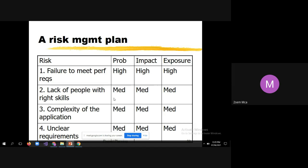For 'lack of people with right skills,' the probability is medium — for example, if you don't have someone who can do automation, you can bring an existing member from another project or provide training. The impact is medium and exposure is also medium. The mitigation action is to provide training, hire, and clearly explain the requirements so they get up to speed as soon as possible.